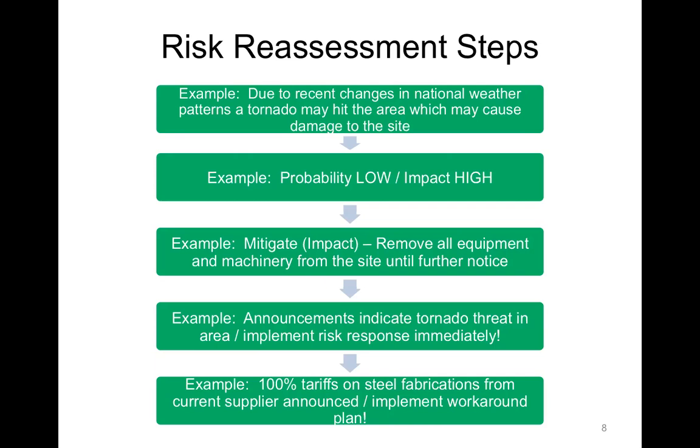So it's now a problem, and we can only, at our best, react to that. We cannot be proactive anymore. So we implement something called a workaround plan. A workaround plan is essentially a contingency plan, except the planning and the resources and the money don't come from a contingency plan, which is under the control of the project manager. It comes from something called a management reserve. The management reserve is controlled by the sponsor. It's controlled by the organization. It's to manage those unknown risks.